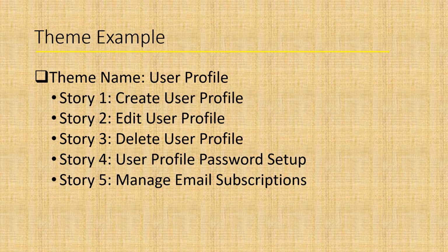Now, if we consider the example of a theme, we have already understood what exactly a theme is. Theme is nothing but a collection of related user stories. We can think of it like a bundle. So in a very simple example, if user profile is a theme, the related user stories could be create user profile, edit user profile, delete user profile, password setup, and manage email subscription.